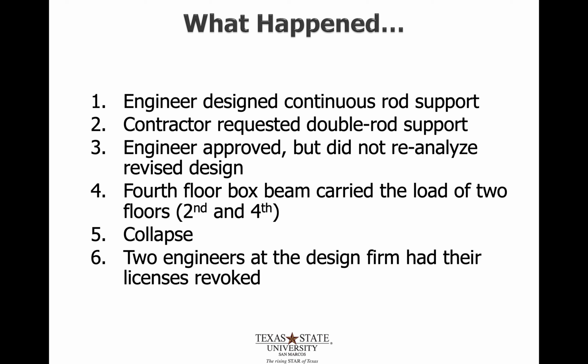Then the two engineers that designed this, just approved it and did not reevaluate this, then had their license revoked because of poor project administration. They didn't go through the proper steps of reanalyzing that and confirming that that is okay.